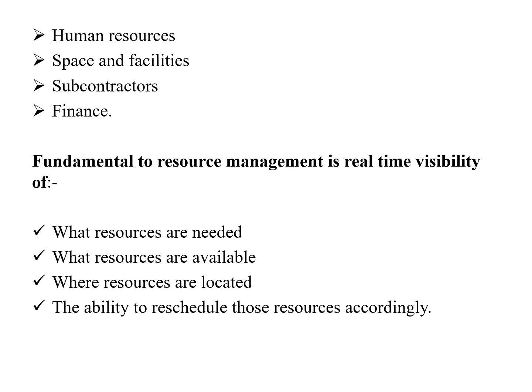The contractors, the finance, yes, 100%. Unless and until you have money to spend, you cannot start your project. Sometimes you will get loans from the bank, the owner of the property or the construction site. If you want to get the finance, the drawing should be ready. You should produce the drawing, and step by step they will release the fund. All this information should be known.